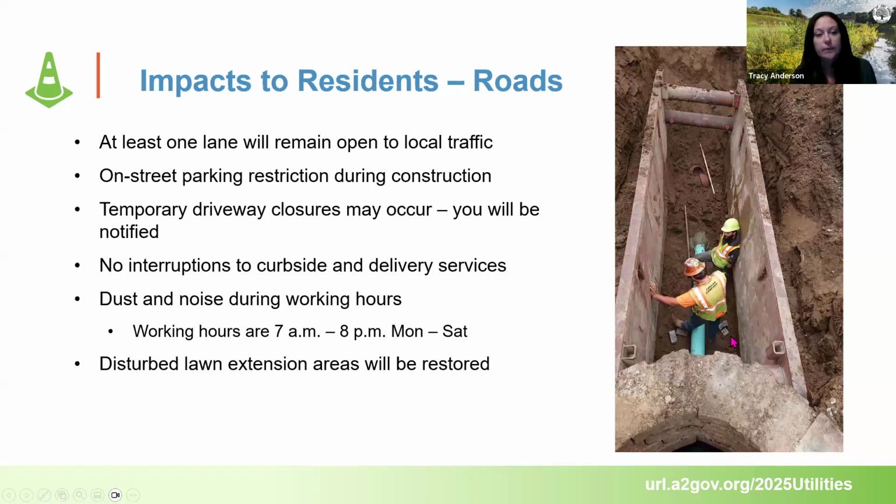Through construction, one impact to residents on the road is that there's going to be at least 1 lane open to local traffic at all times. You'll always be able to go to your house. On-street parking is going to be restricted during the daytime. There will be temporary no parking signs posted on the adjacent roads.